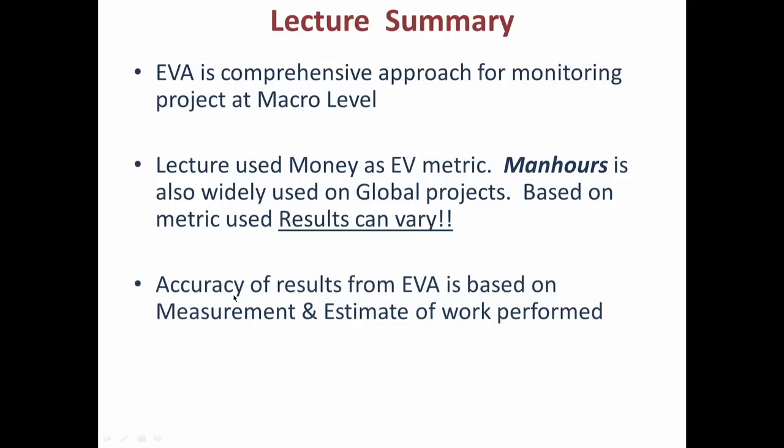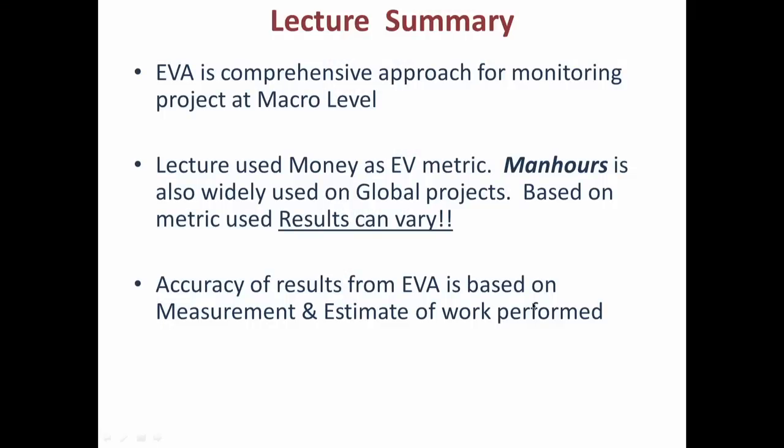While EVM is a good comprehensive technique, the accuracy of results depends on the measurement of work performed. If measurement of work performed is not done correctly, the project parameters will not indicate things accurately. Measurement can be subjective — there can be estimates and variations — and this must be factored in when using earned value values.